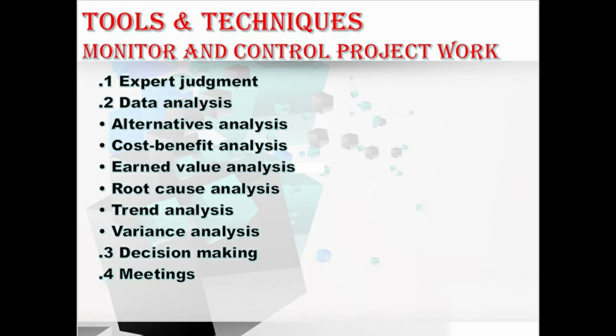Let's move to the next technique. We have the data analysis technique, which includes alternative analysis, cost benefit analysis, earned value analysis, root cause analysis, trend analysis, and variance analysis. Let me explain one by one, first with alternative analysis. The alternative analysis technique is mainly used to select the corrective actions or a combination of the corrective and preventive actions to implement when a deviation occurs.